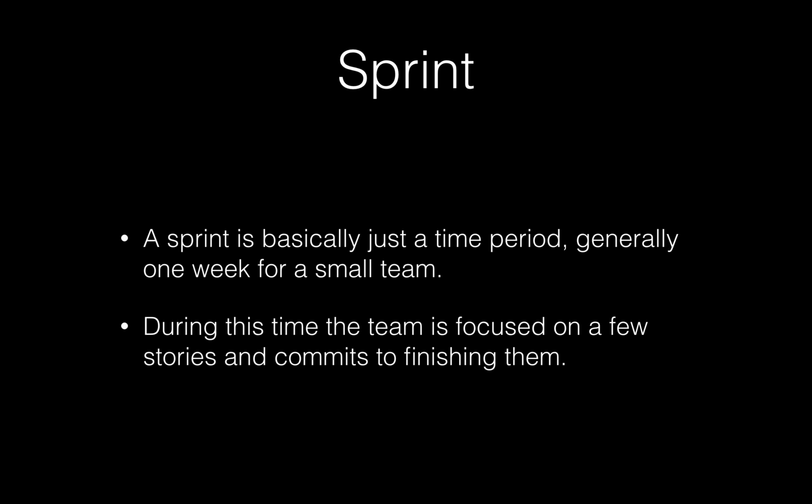So first, a sprint. A sprint basically is just a time period. It's generally anywhere from 1 week to 1 month. Generally, no one keeps it more than a month. Otherwise, it's too long. It goes into a waterfall then. So basically, every sprint, or every week if it's a week for us, or it's 2 weeks, we can still decide. Generally, for small teams, it's 1 week.